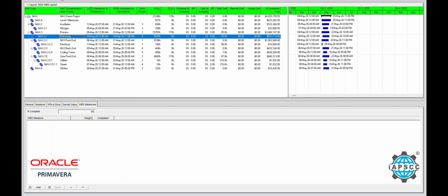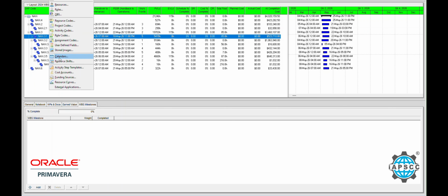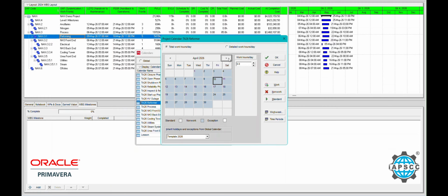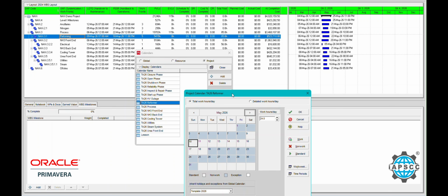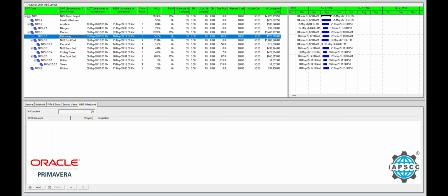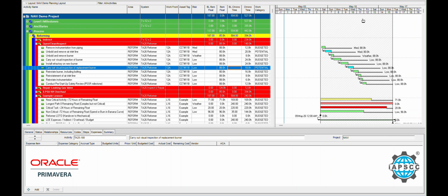You can see here the mechanical phase availability is from 7 a.m. May 9th to 11 p.m. May 18th, giving us roughly 21 shifts to complete all the approved asset, process, and mechanical integrity work assigned to the system. We create this window using a project calendar as shown here for the various systems and phases. I've created a curtain in the activities Gantt chart view to highlight the mechanical window for reforming.